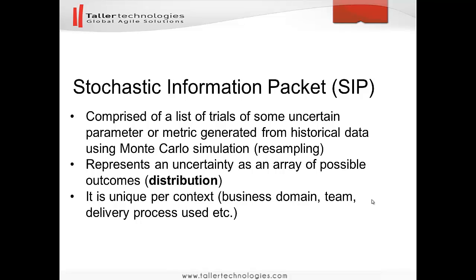It is because we cannot compare one development system's historical delivery data with another team's. If we do have historical data about average takt time, it will be invalidated if any of the following happens. For instance, team structure is changed, development process is changed, technology being used is changed. For instance, we introduce pair programming. If anything of this changes, all historical data will be invalidated, including the SIP itself.